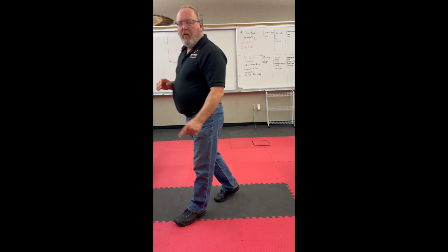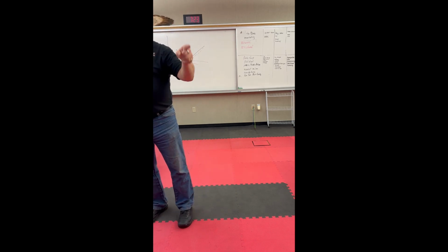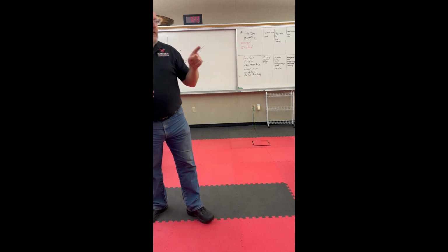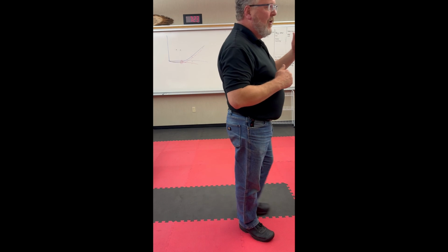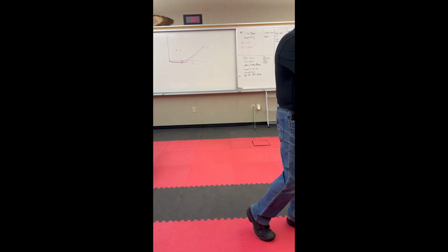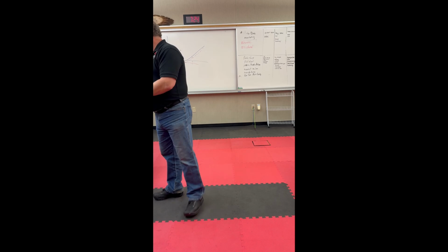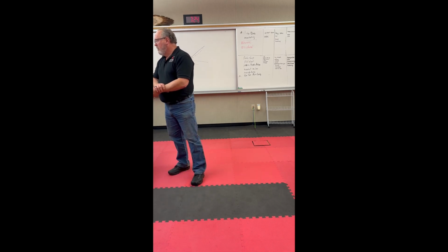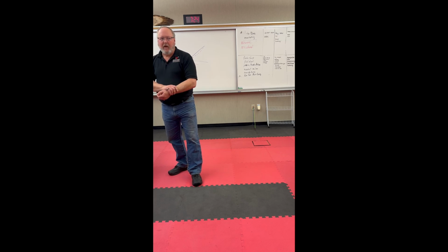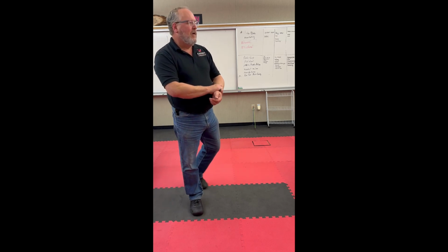Your milestones are the same thing. They're the critical junctures in the business that have to be delivered. And so the depth that you go into the milestones is the depth of management. I try to keep my milestones greater than 1 week of work. Now, in your case, that's 20 hours. But if you're having a milestone for every 5 hours of work, you have too many milestones.